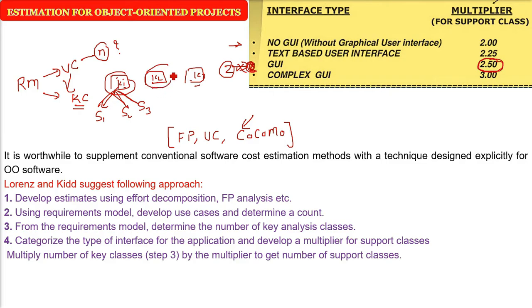Now you have the key classes and the support classes. Classes are the basic size estimation for object-oriented projects. For each analysis class category, multiply: if it is no GUI, multiply by 2; for text-based user interface, multiply by 2.5, and so on.